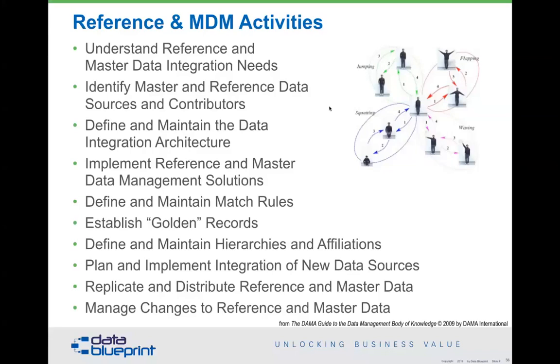All right, next thing. You need to have the architecture. And I've showed you a couple of architectural diagrams. It's going to be a variation on that. The reason it's going to be a variation on those diagrams I showed you before is because you're going to bring your legacy systems on, hopefully one at a time in a gradual, evolving fashion as opposed to a big bang switchover. I've almost never seen those work in 35 years, but give it a try if you want to try and beat the odds on that. But you need to be able to implement some of these solutions.